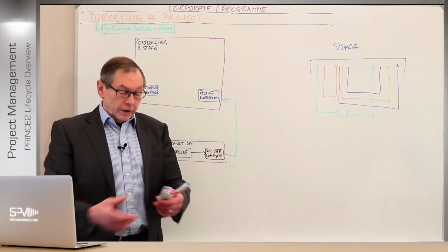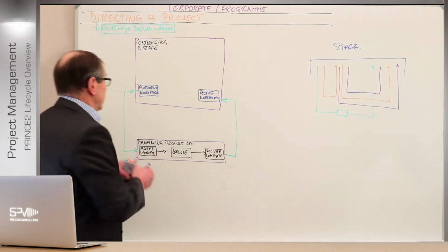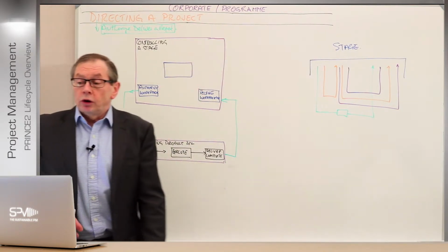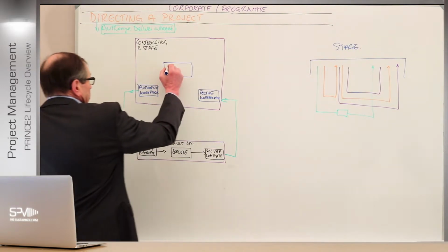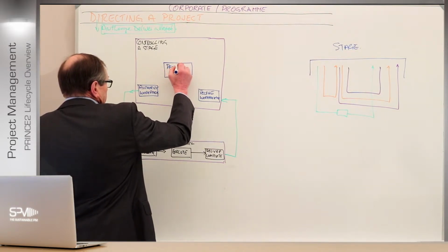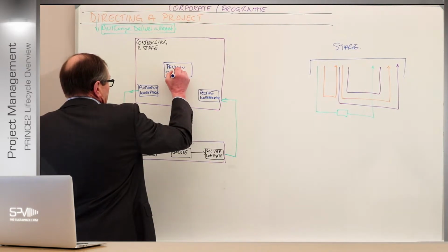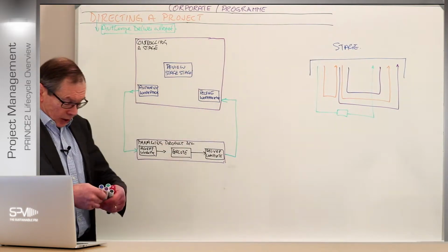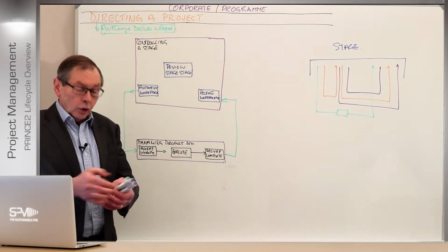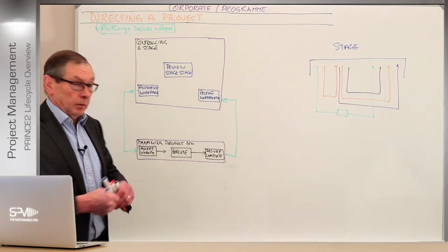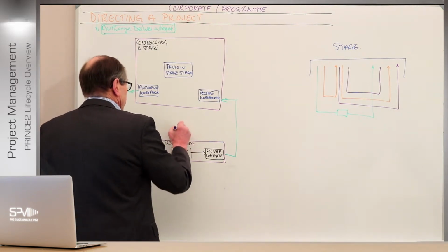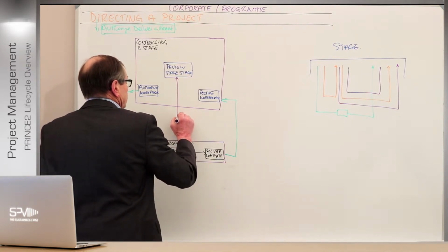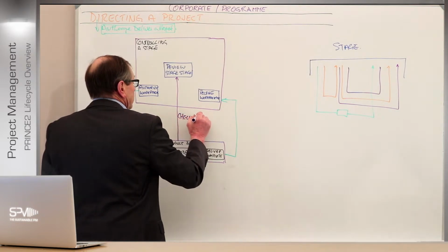Now, other things happen within that stage. So, the first functionality that goes on here is for the PM to monitor and keep control on the stage, right? So, review stage status. Where are we at any one point in time with the stage itself, right? And that's done in various formats. The first one, of course, is to look at how the build's getting on. So during the managing product delivery, there will be a feed in here with the checkpoint reports. Checkpoint reports.